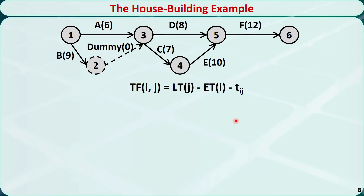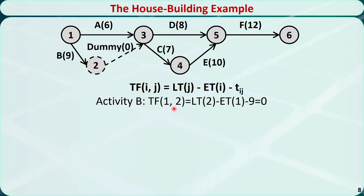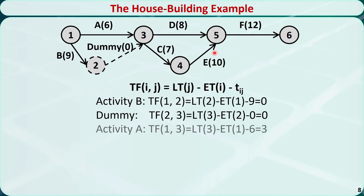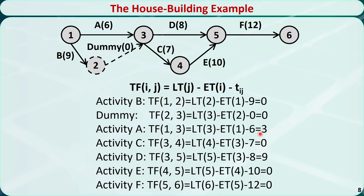Let's use the house building example to do the calculation. Activity B is denoted by arc (1,2). The total float of activity B equals the late time of node 2 minus the early time of node 1 minus the duration of activity B, which is equal to 0. Similarly, we can calculate the total float of all other activities. We find that activity A has a total float of 3, activity D has a total float of 9, and all other activities have a total float of 0.